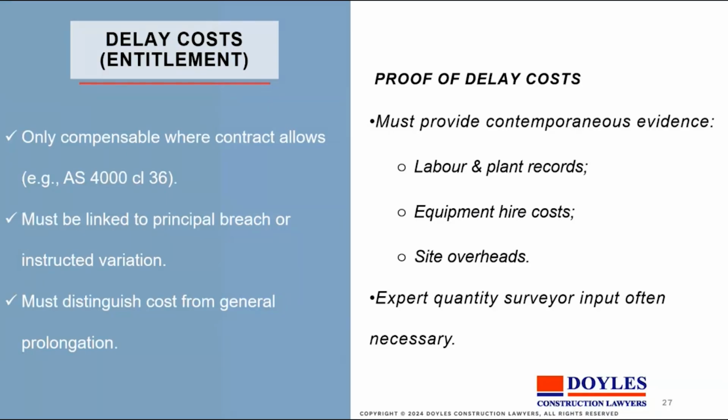Proper measurement of equipment costs is important, and it's often a leading component of contention and value in any sensible delay costs. The other aspect is site overheads. Again, the situation is that you should be careful to record your site overheads, careful to make sure that all of the equipment and accommodation that you've provided as a contractor is fairly recognised.